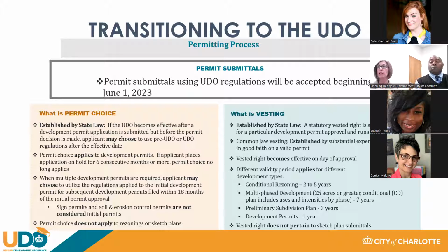Another question we get is, what is vesting? This too is established by state law. A statutory vested right is a validity period for a particular development permit approval and runs with the land. Common law vesting is established by substantial expenditures made in good faith reliance on a valid permit, and a vested right becomes effective on the day of approval.